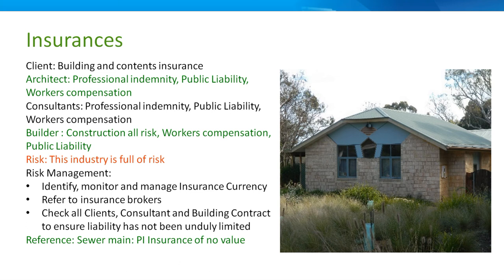So we couldn't get a building approval because ACTU hadn't released the documents because they're swamped. And then the builder found the sewer main by doing services detection. And it's 5 metres down. And 5 metres is a long way, isn't it? So if it was a sewer main that sits round and has to be fixed, they have to dig a 5 metre wide trench and then a 2.5 metre wide trench. You with me? So they have to dig this like as big as the room of trench to fix it.